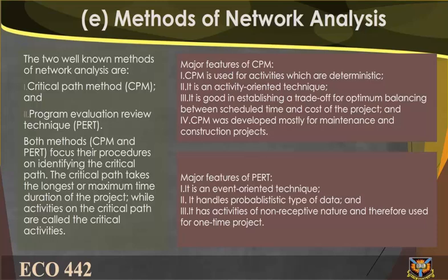called the critical activities. Major features of CPM. 1. CPM is used for activities which are deterministic. 2. It is an activity-oriented technique. 3. It is good in establishing a trade-off for optimum balancing between scheduled time and cost of the project. And 4. CPM was developed mostly for maintenance and construction projects.